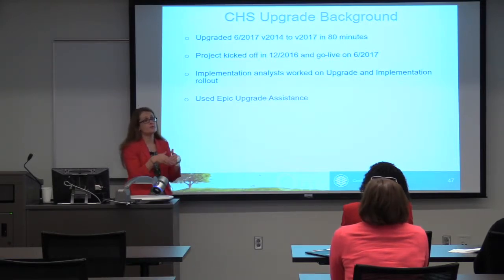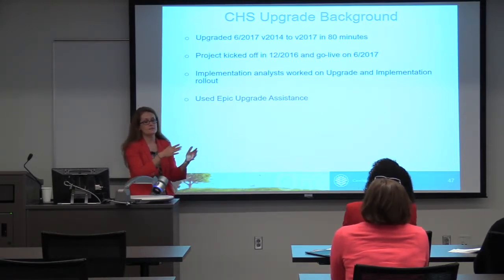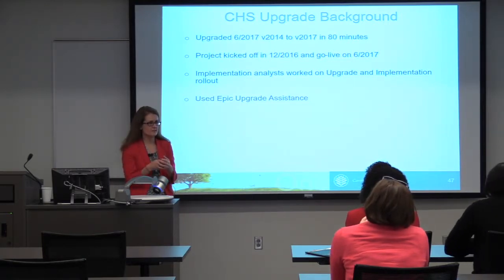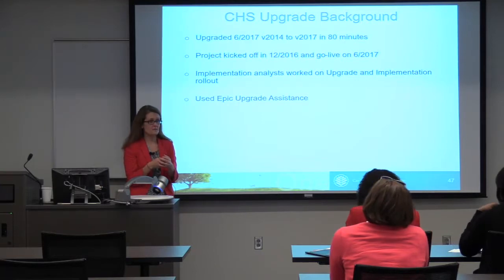And then, especially as we shifted our go live approach, like for Pineville, behavioral health is very different in their workflows. So we were able to focus on them, find out exactly what they need, build it, and then test it, hopefully successfully, and then implement it, which I feel like is a little different than just shoving it in.